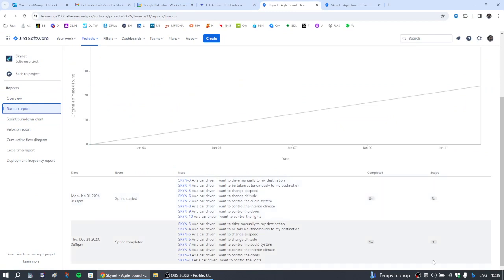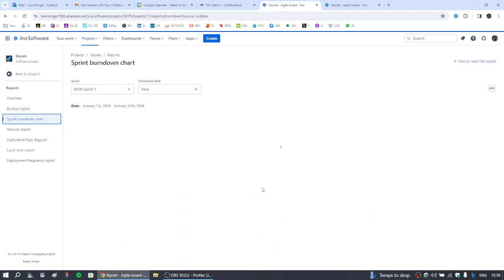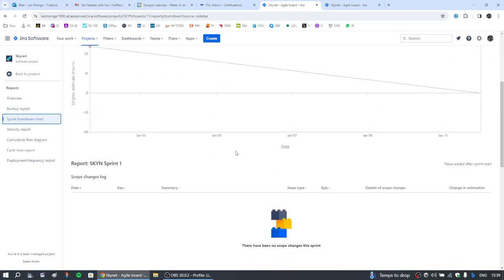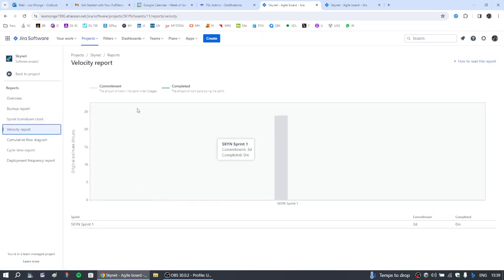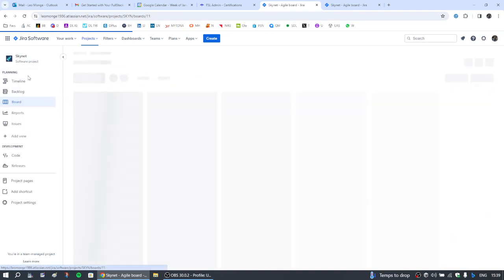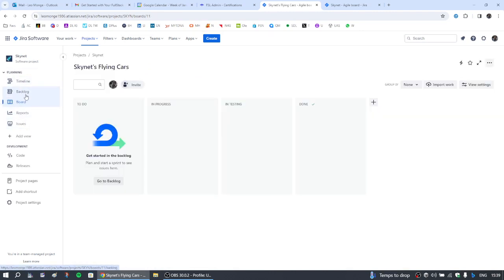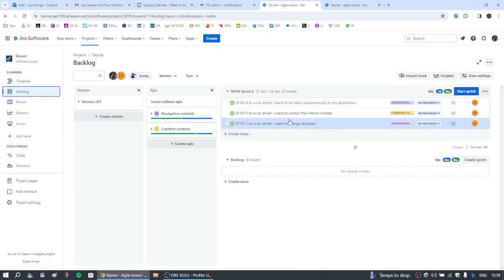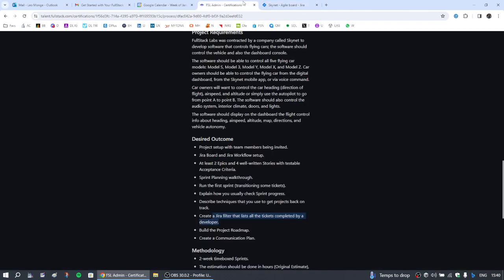Since we put some things with time, we can have some good information in here, but of course this is not real information, and we should probably have some tasks that take much more than was estimated. Instead of thinking that it will take 8 hours every day, it takes much more, and then some things are left behind, like the first two, the ones that couldn't fit into the first sprint. We just wanted to make the point that sometimes we find things later on in the exercise.